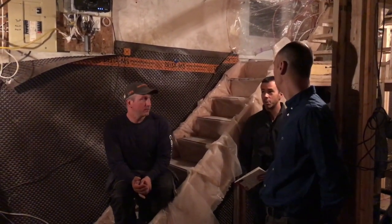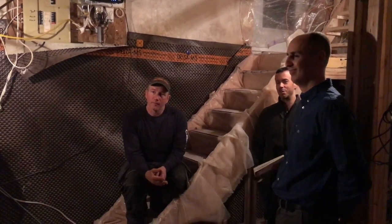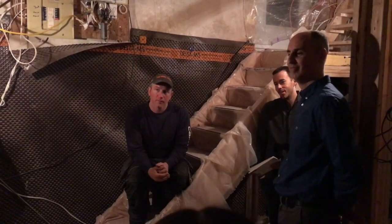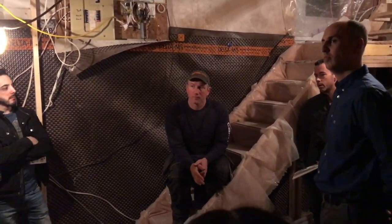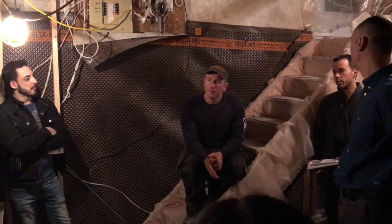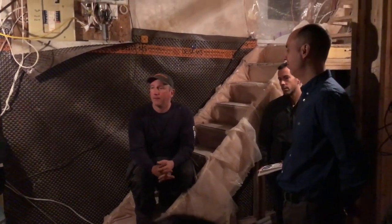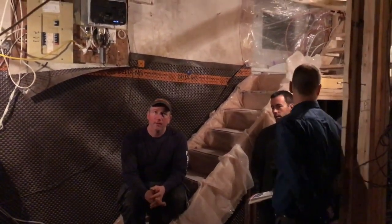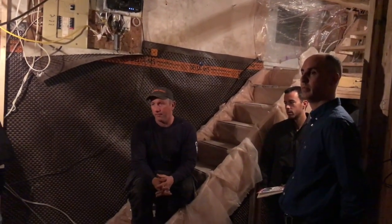If the zoning changes in Toronto, it takes really long for these things to happen. Do you have to open the walls for them to be inspected as a triplex? No, if you document it with photos and things like that. That's part of befriending the inspector and having a good line of communication. They could say no, but we're documenting. You tell the inspector what you're planning to do. Yes, 100% upfront.